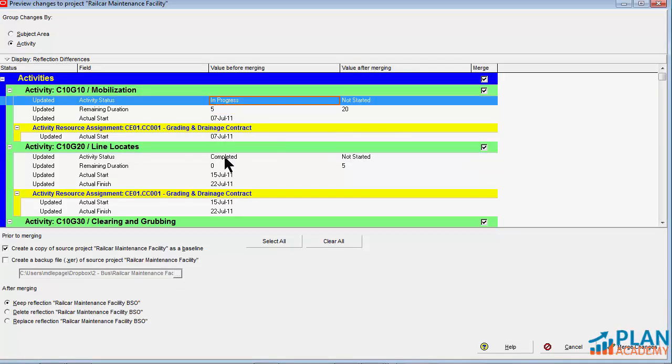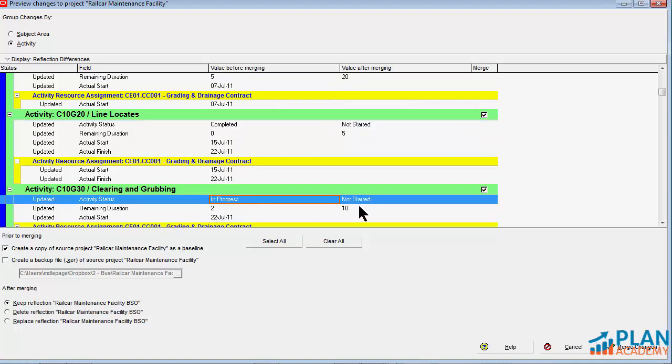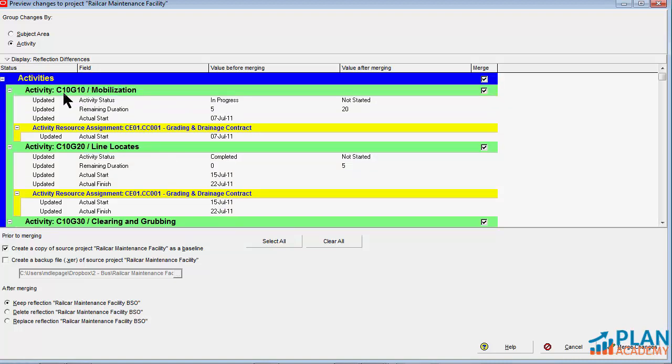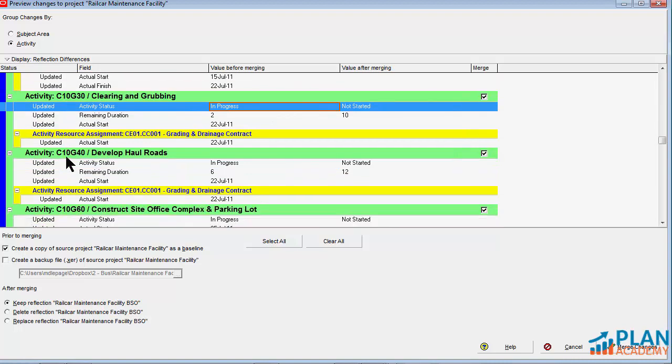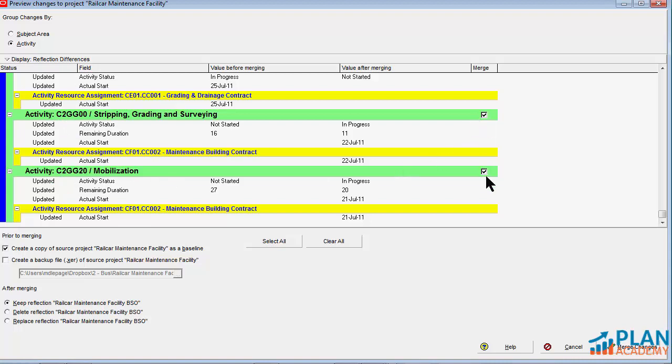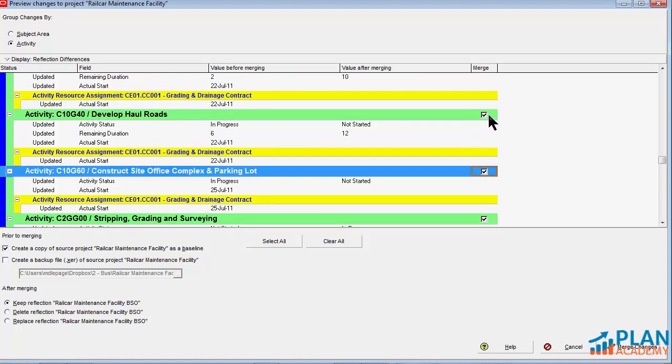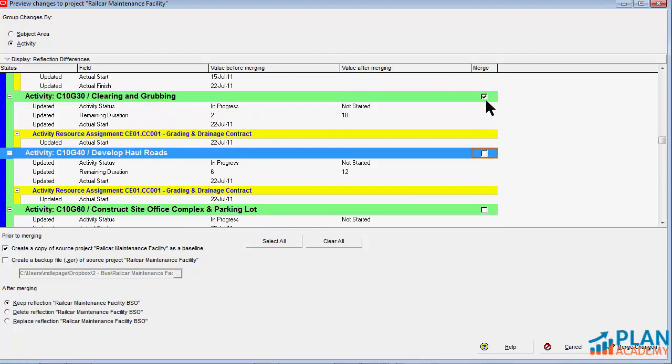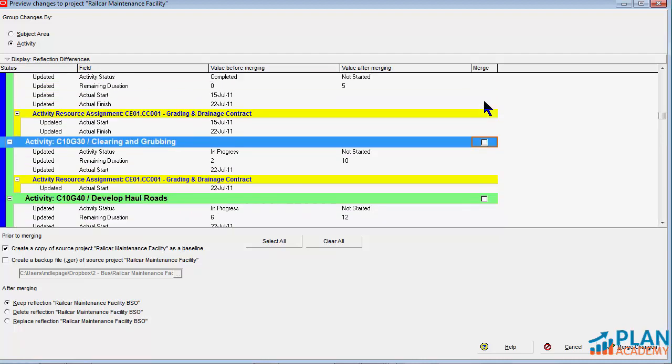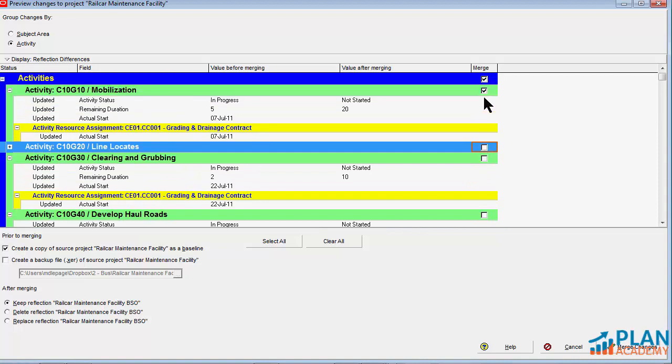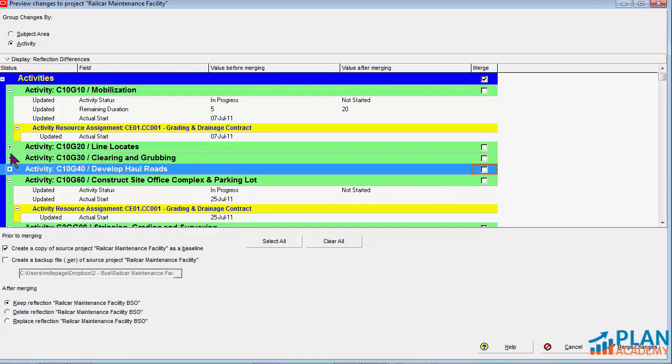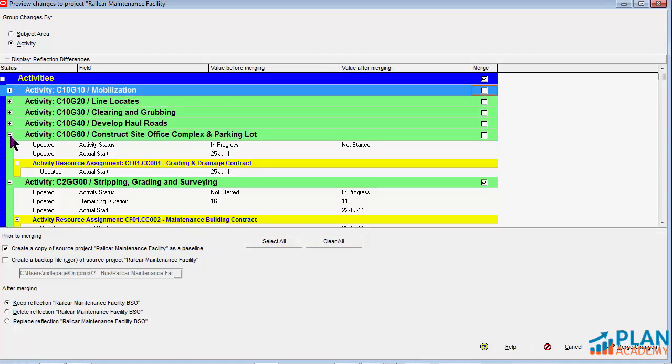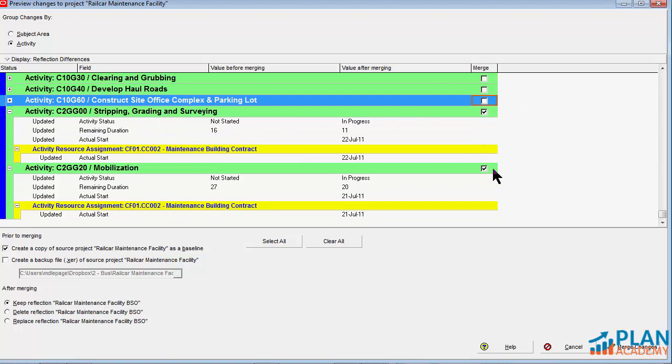So let's go back to Primavera. So these activities are not from the current contractor. And the way I can tell is because we have proper activity numbering here. So these are all C10 series activities and the real updates from this contractor are the C2G guys. So these two, I want to include and these other guys I want to leave out. So as you can see, if I kind of roll these up, I've left those guys out. I'm going to include just these two activities from the C2G series. Let's go ahead and do the merge.